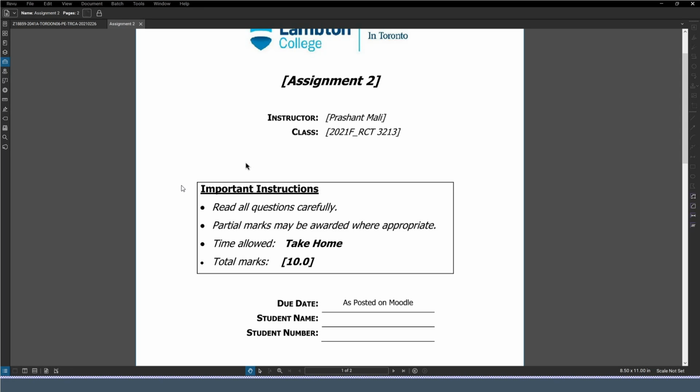So let's say Brampton Brick sent you a quotation on October 10th saying that from November 1st our brick prices are going up, whatever the change in prices, 1 cent, 5 cents. That needs to be updated, right? So you update your database and put the date when it was updated, and you put a reference for what made you change that. Sometimes it will be a quotation which is helping you in updating that. Sometimes it is